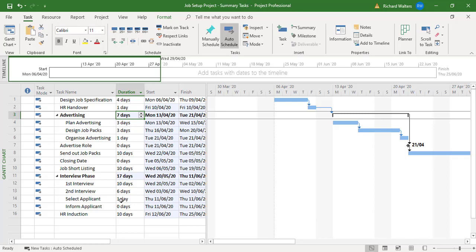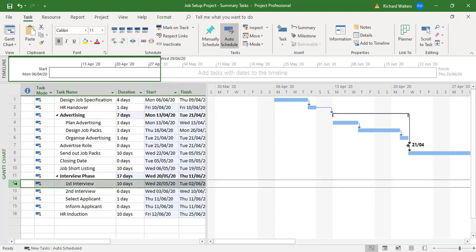And the interview phase is now updated to 17 days, which gives it the ten plus the six plus the one.